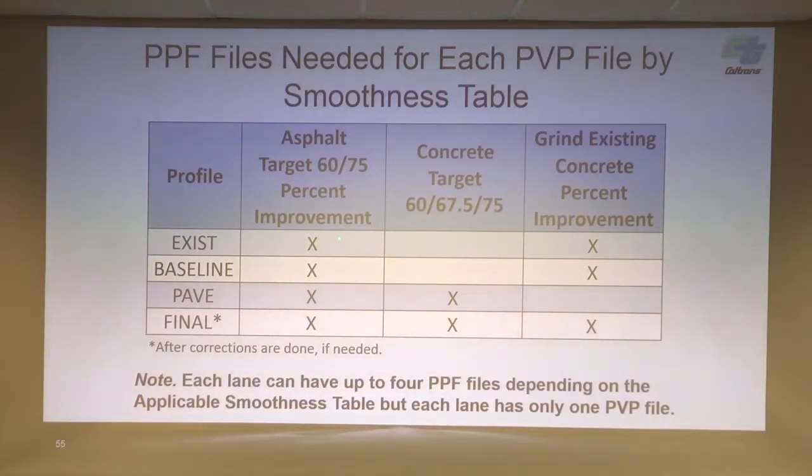Okay, so with this new spec, the issue that you had on the other project, those files were, I believe, required to be submitted, but they were supposed to be uploaded to a website. The difference between the old spec and this new spec is that they have to give us notice when they're gonna go out and run these profiles. We're supposed to go out and witness them.